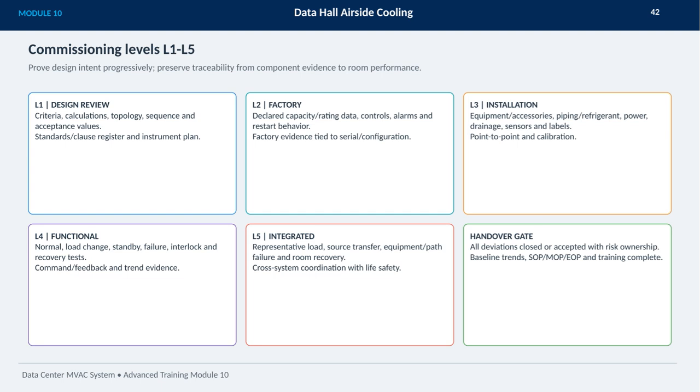The process culminates at the handover gate, where all deviations are resolved or accepted with risk ownership. Baseline trends are documented, and standard operating, maintenance, and emergency procedures plus training are complete.